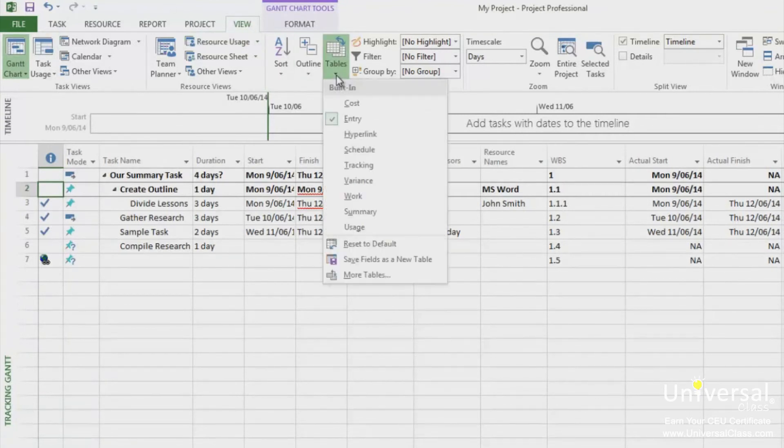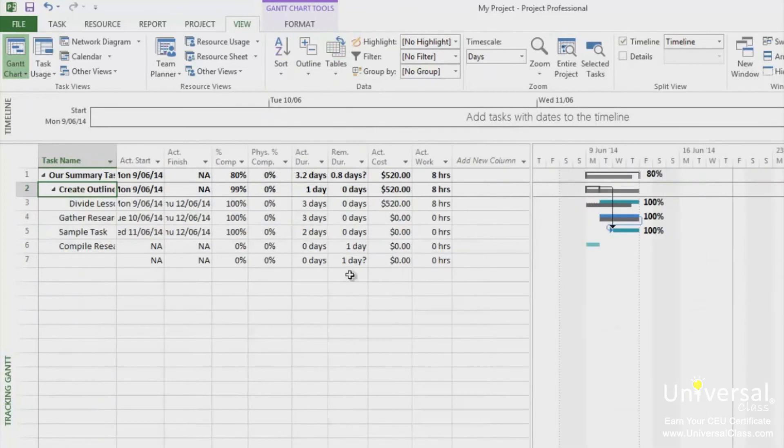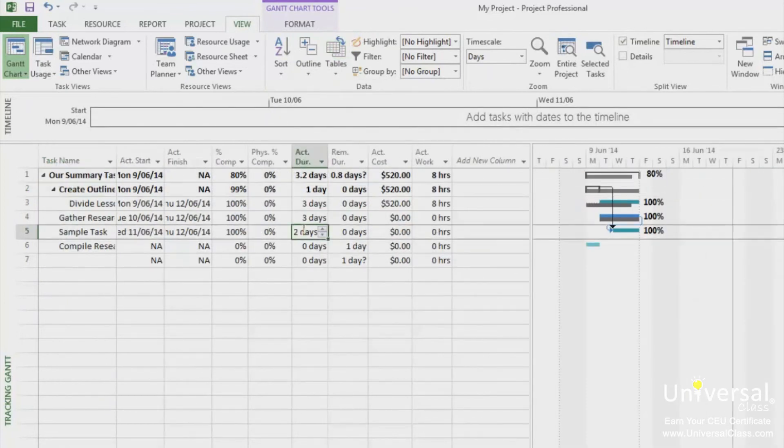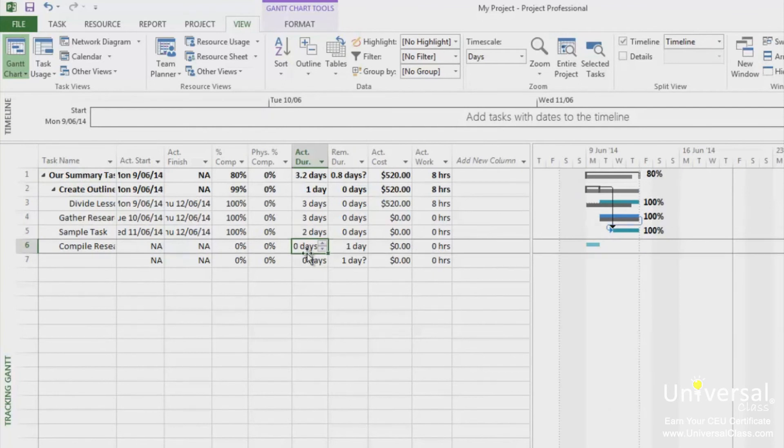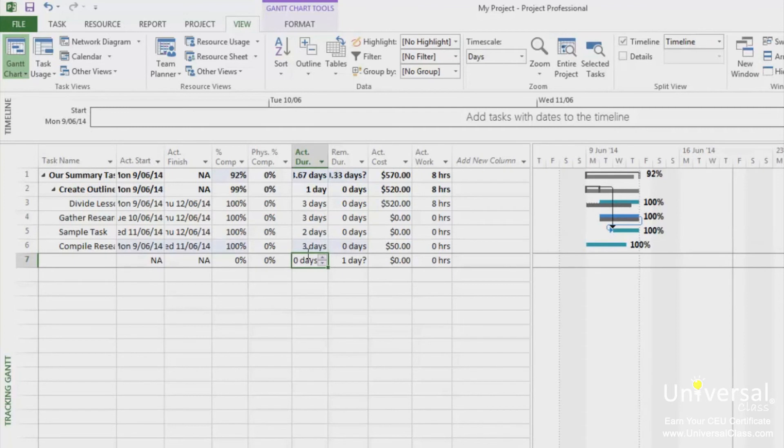Go to the Actual Duration column for the task you want to edit the duration for. Enter the Actual Duration. You can also enter a remaining duration in the Rem-Dur column for remaining duration.